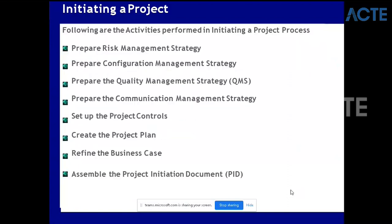The activities performed in Initiating a Project are: prepare the risk management strategy, prepare the configuration management strategy, prepare the quality management strategy, prepare the communication management strategy, set up the project controls, create the project plan, refine the business case, and assemble the project initiation document.